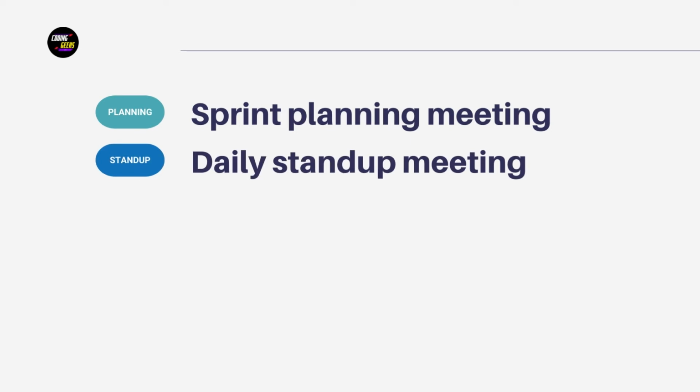As the most frequently held Agile Scrum meetings, daily stand-up meetings are the bread and butter of Scrum sprints. They are short, to the point, and as the name suggests, held each day. They are typically the first meeting of the workday. By the end of a stand-up meeting, each team member should have answered 2 questions. What did I accomplish yesterday and what am I going to accomplish today? Stand-up meetings are also a time for team members to bring up any roadblocks they are facing.